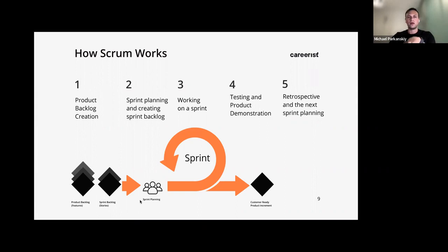And we look at the backlog. We look at the backlog stories, and we think about, okay, well, what can we get done in the next 2 weeks? Who's in the office, right? Who's taking vacation? Do we have all of the engineers, or we only have, let's say, one person working this next week? If we have everyone, that means we have a certain amount of people. That means we'll be able to pick up more work, right? We'll be able to pick up more bug tickets or more features that we can build. And we grab a bunch of these new features that we want to work on, and we pick them up, and we decide that we're going to work on them for the next 2 weeks.